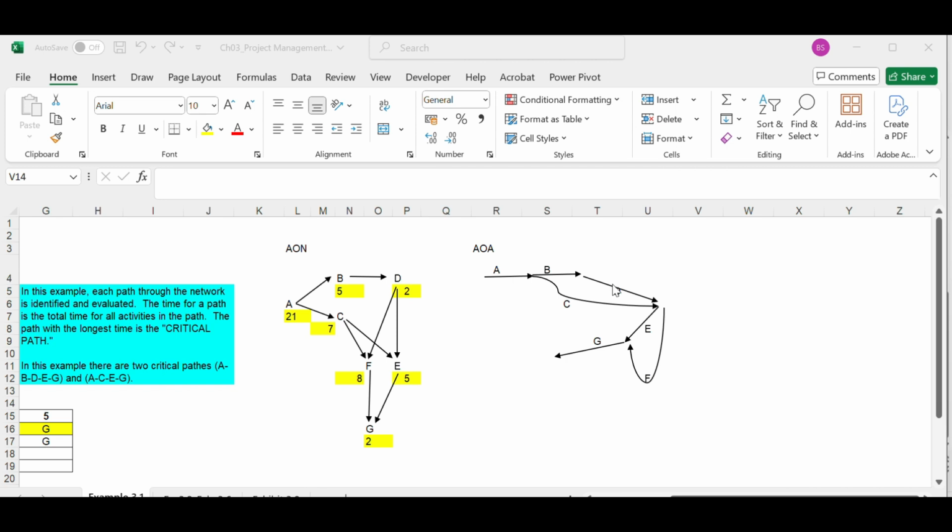The limiting factors of a project schedule are the minimum time each activity needs, the logical relationship between activities, the imposed deadlines, and the resource dependencies. The critical path considers only logical dependency and the minimum time each activity needs. A critical path plus the resource dependency forms a critical chain. In order to make a schedule, we should know the WBS, the predecessors, and the time estimates. In analyzing a network diagram, the first step is to find the critical path. Starting from the critical path, we build the critical chain.